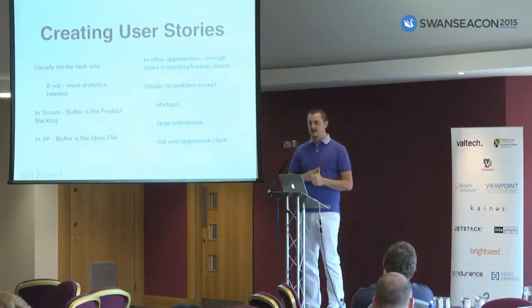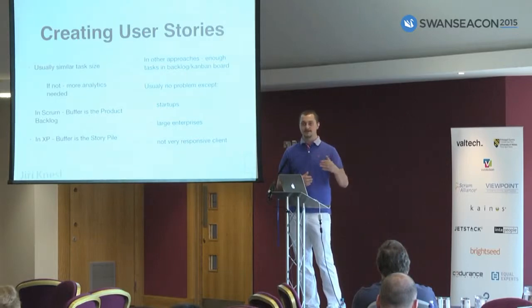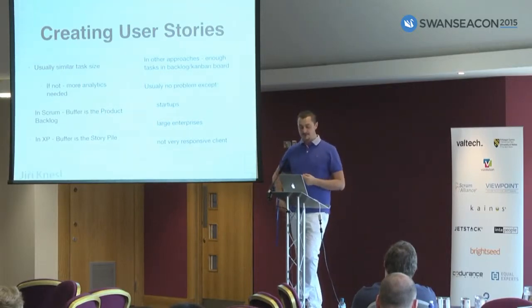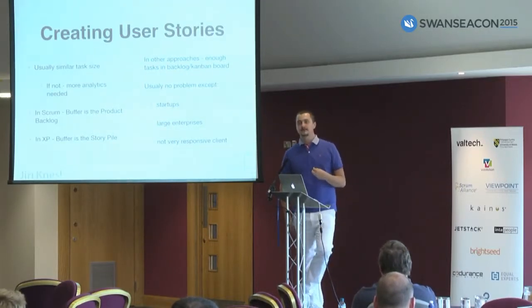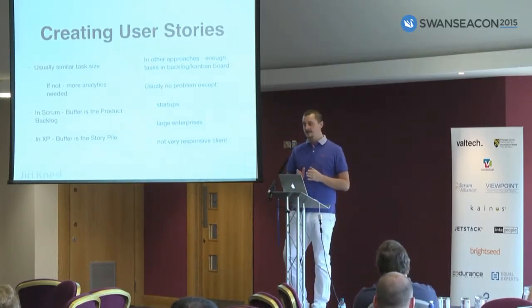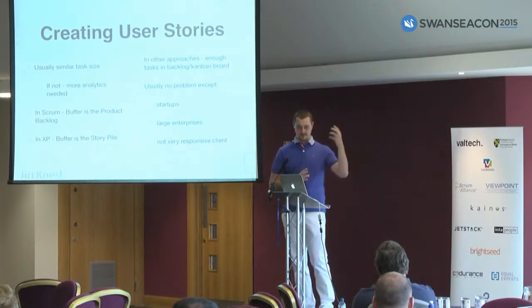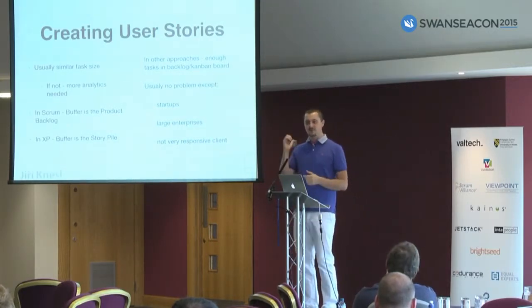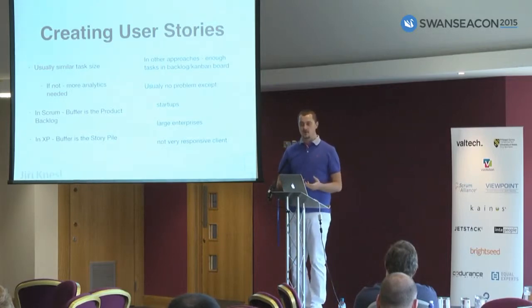Sometimes this is first in startups, because the direction changes every couple of days, so you are unable to plan days or weeks or months into the future. Or in large enterprises. When you have large enterprises, as I told, the analysis phase tends to be very long, and people tend to spend a lot of time doing analysis, and it can lead to starvation of the bottleneck. Then the third is that you have a not very responsive client. When you develop software for somebody else, it's not your product, it's a product for somebody else, and the person on the other side of the phone line isn't responding very frequently, or the time to respond is very slow.